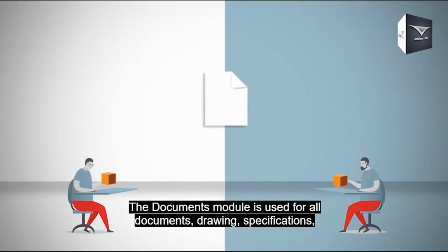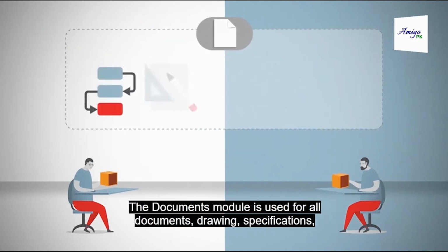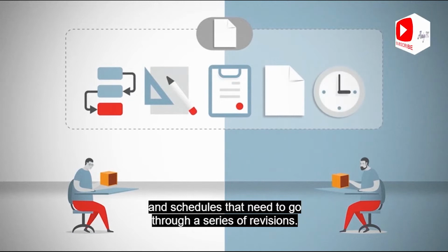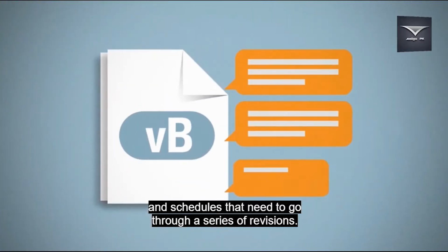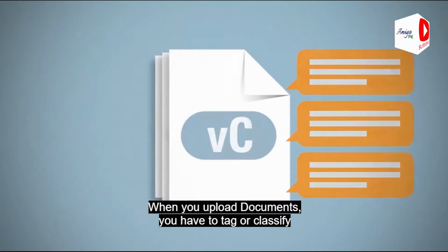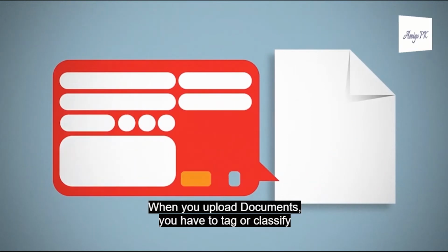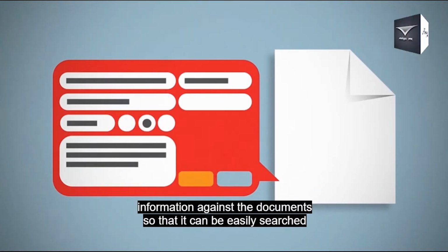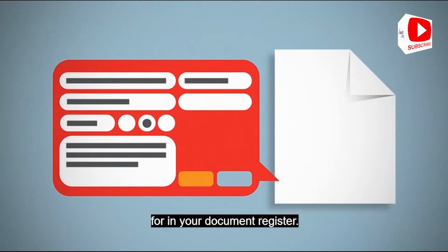The Documents module is used for all documents, drawings, specifications, and schedules that need to go through a series of revisions. When you upload documents, you have to tag or classify information against the document so that it can be easily searched for in your document register.